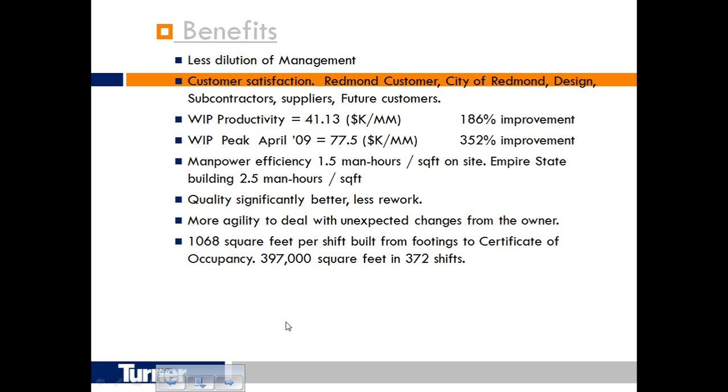When you think of studs and pipe and nails, yeah, they are interchangeable parts, but we're able to do what you hear a lot in the business as prefabrication, offsite in larger units. When we know where pieces are going to go, we're able to do that work offsite. The benefit is there's a lot less manpower on the job site, so there ends up being less dilution of our management and our G-stays.